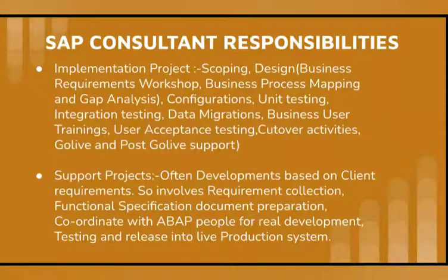So why are we conducting Mark 1, Mark 2, Mark 3, Mark 4? Mark 1, because we need to know how the users may fill the templates. If they are filling initially, we may not know how well the business users are enriched with the SAP knowledge. If they are completely new, they may make mistakes and fill the template wrongly, even if we explained it clearly, or some communication mistakes may happen. So through Mark 1 we will learn what the data mistakes are and what data needs to be corrected